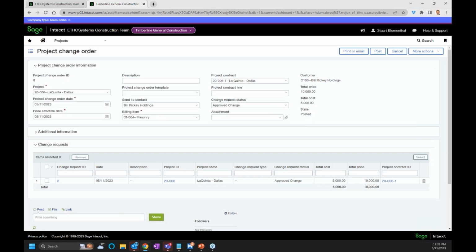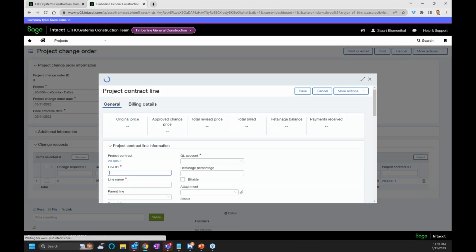If you wanted to create a contract line, well, let's just do it. For example, I have some people that use a C01 or a 99, whatever you do there. You can create another line down below and have the change orders go to a specific new contract line instead of an existing one. So great question. I forgot to mention that. Thank you very much for that question.